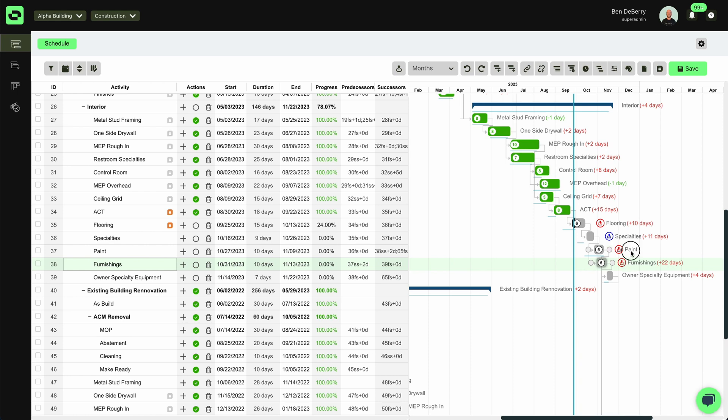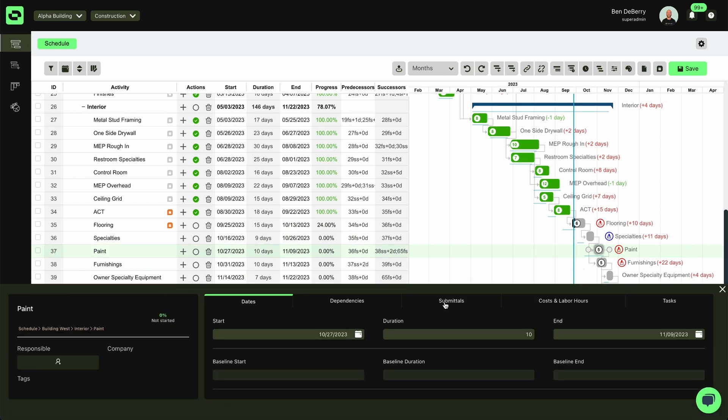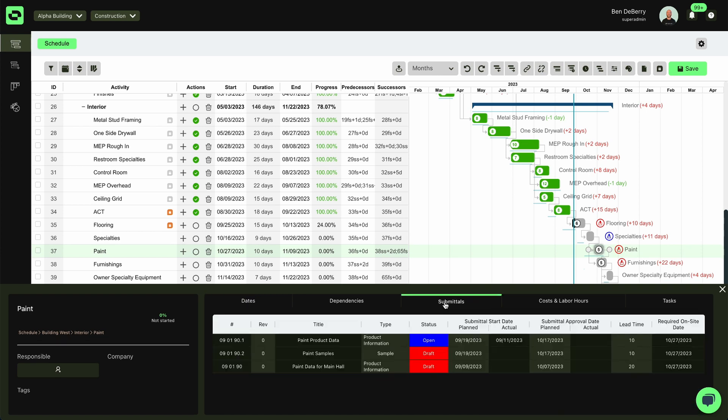The red is going to denote any overdue submittals that I have. I can open up my activity card. I can navigate to my submittals tab, and then I can see my open or draft submittals, and if I'm moving beyond my planned submittal date or my planned approved date based off the lead times that we've given. When the status has been updated in Procore, our approval dates and our submittal dates will change here.